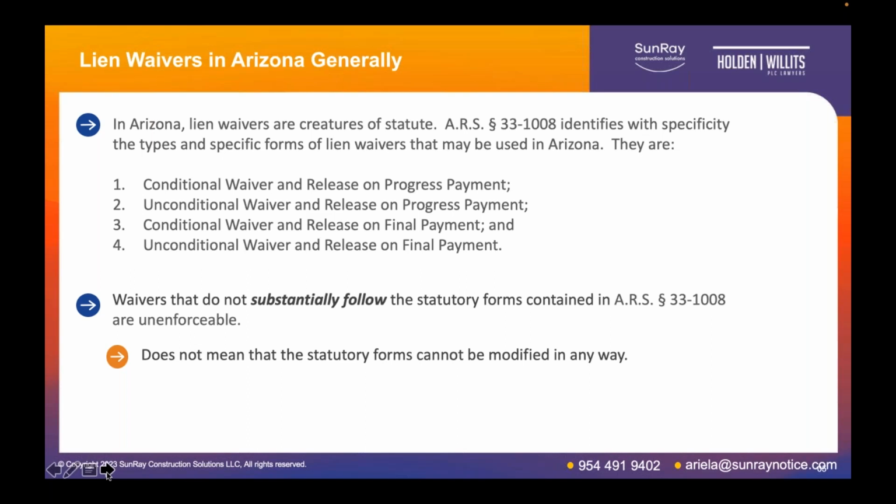But the key word here, and an important distinction, is that the statute requires that the forms substantially follow what's in the statute. And that doesn't mean that statutory forms cannot be modified in any way. In fact, there may be times, we can talk about those a little bit later, where you may want to slightly modify one of the statutory forms. Again, it should still substantially follow what's in the statute, but there are circumstances when modifications may be necessary.